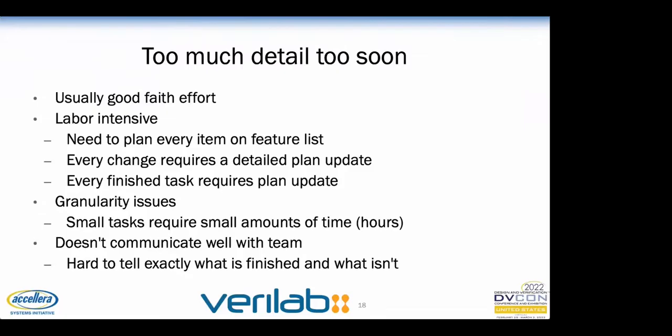This can be okay if we have detailed and finalized specifications for exactly what is going to be built to ensure that there aren't going to be any changes. If, however, we're dealing with draft specifications or protocols that are still in development, much of this effort is likely to be wasted. This process can be very time-consuming if the project is large. It's also very difficult to estimate the effort required for a single task in isolation. If people on the team have different assumptions about what is included in each list item, estimates can differ wildly.